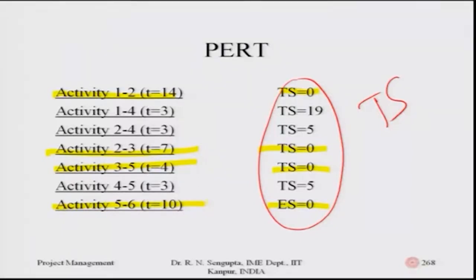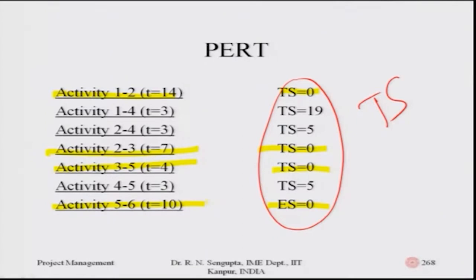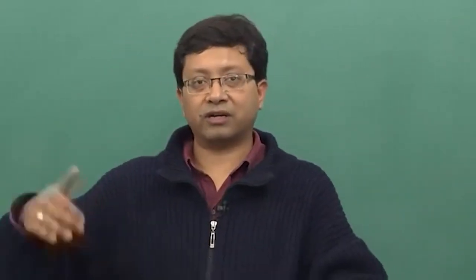Revisiting slide 270: total slack for one-two is zero and free slack is zero. For one-four, free slack is fourteen while total slack is nineteen, meaning there is a cushion available. Based on total slack and free slack you can find available cushions and decide whether to shift a job in block or in parts, as long as it does not affect the total critical path duration. Crashing is not being considered at this stage.